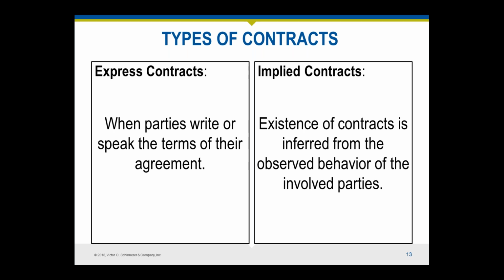That can lead to questions such as, let's say a client says to you, please design a new deck for my house by next week and I'll pay you $1,000. You don't say anything and you don't offer a contract, but you produce the deck design within the week. Did you have a valid contract with a client? Yeah, I would say you did. The law would infer that your actions created acceptance of the offer and a contract existed, and therefore the client would be obligated to pay the $1,000.